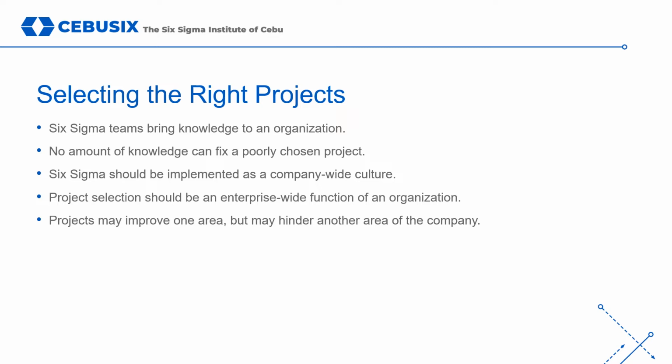It is critical that the projects be completed in this time frame in order to keep the organization and resources focused on the project. Organizations typically lose interest in projects that run longer than 6 months. There should be clear quantitative measures of success. The importance of the project to the organization should be clear, and the project should have the full support and approval of management. People are more likely to support a project that they can see as clearly important to the organization. Organizations need to develop their own specific project selection criteria.